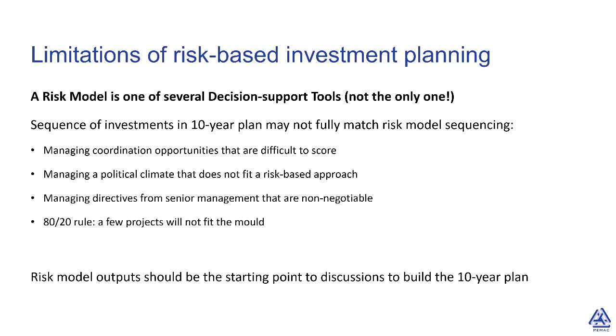And some of these factors are things like coordination. We have a transportation department, we have road projects, we have water projects. It might mean bringing some priorities forward because we don't want to dig up a road that's just been replaced. We also coordinate with our local area municipalities. So these kinds of coordinations are very hard to model. We also cannot model the political climate. We cannot predict when there'll be these kinds of new changes, directives coming from senior government.